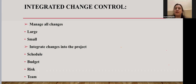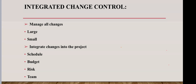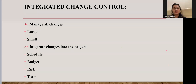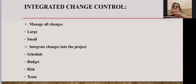Once changes are approved, they need to be integrated into the project — fitted into the schedule and budget. When changes are approved, they must be reflected in the schedule. They will also make changes to the budget and cost, because additional labor or resources may be required.